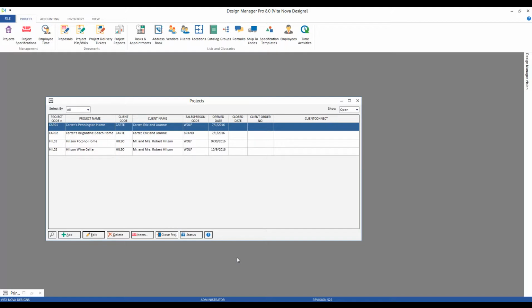Okay, that's a very good overview of project level budgets. Now let's go to the second budgeting stage where we have item level budgets. Now item level budgets are perhaps a simpler concept, yet still a highly effective way of monitoring your budget. And obviously the item level budgets will be input on each of our items. And further, item budgets provide another function in that we can create a preliminary budget document which we can optionally provide to our client when initially agreeing upon the scope of the project.